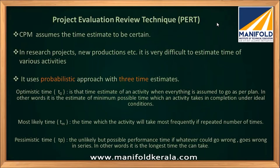We have learned about CPM, so the next topic in network analysis is PERT — Project Evaluation and Review Technique. In CPM, we assume that our time estimate is quite certain because we have previous experience. But for new or research-type projects where activity durations are unknown or uncertain, CPM does not cover those uncertainties. In those situations, we use a probabilistic model.